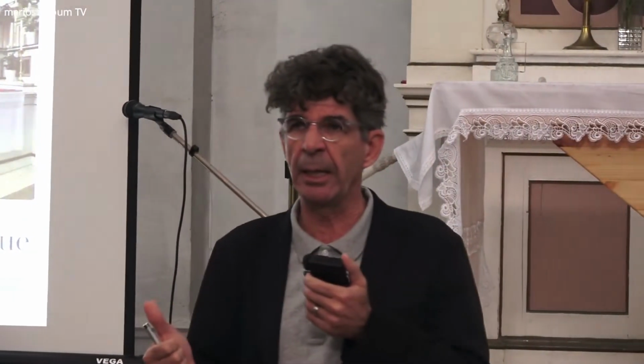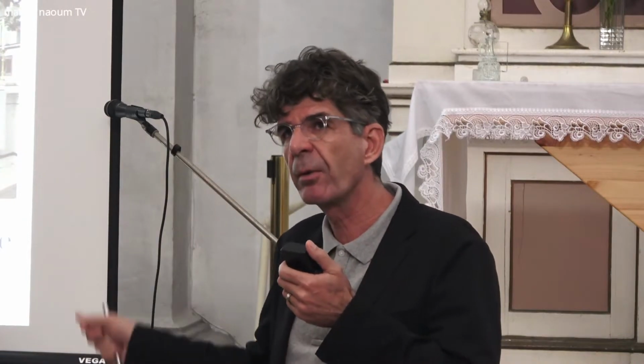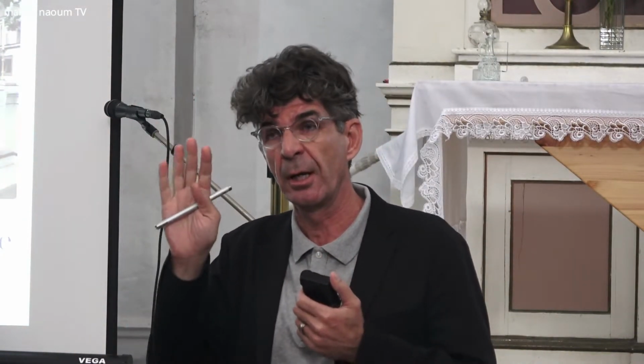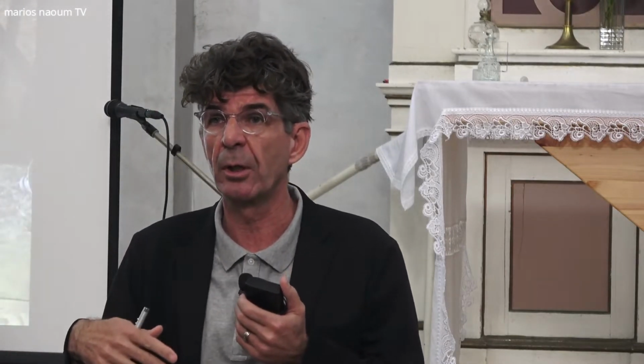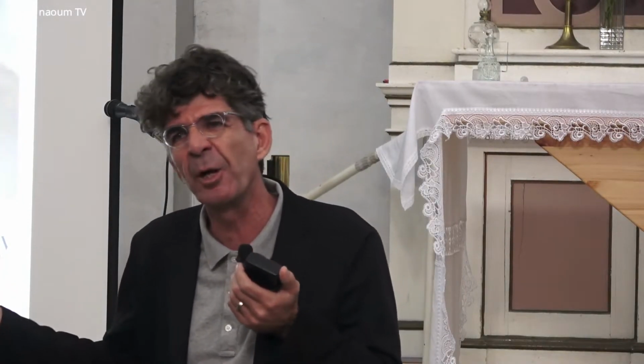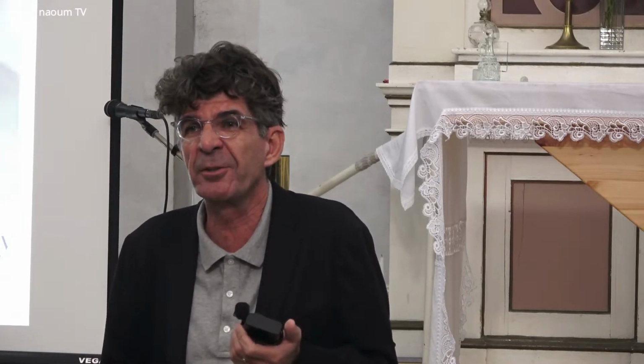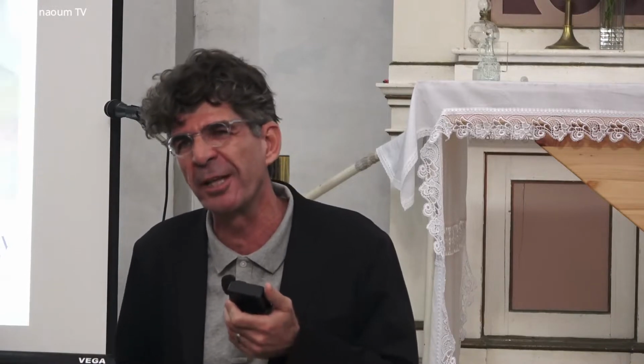As far as how much it's going to cost, now with these architectural engineer drawings, we are involving a quantity surveyor who is going to help us. So these drawings are now going to go to the quantity surveyor, and they will give us a budget. In our timeline, right now, I don't know. If I tell you anything, I will be lying to you. I don't want to tell you something to make you feel good, but it's not there. If I tell you a number, I'm not going to hold on to that number. So the quantity surveyor will make some assessments, and for all the work we're talking about, we are not going out to bid for everything.